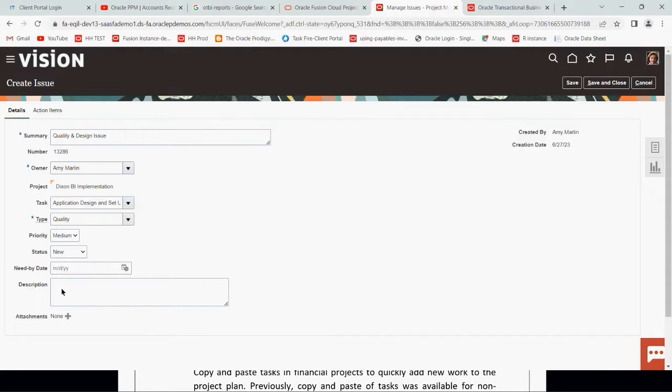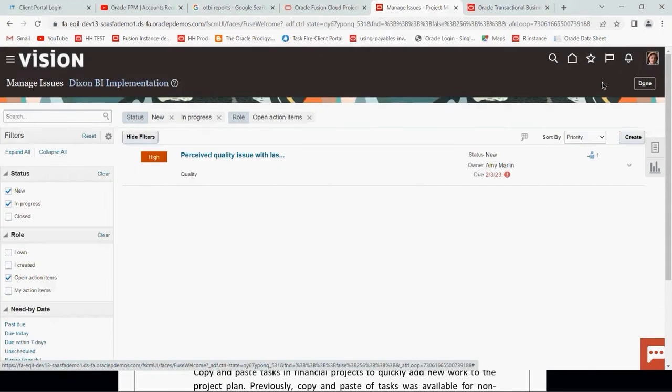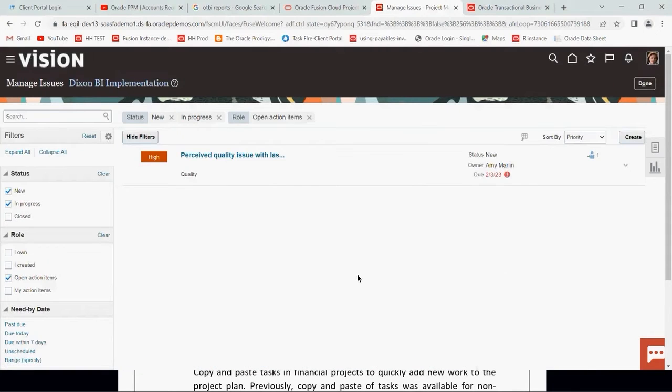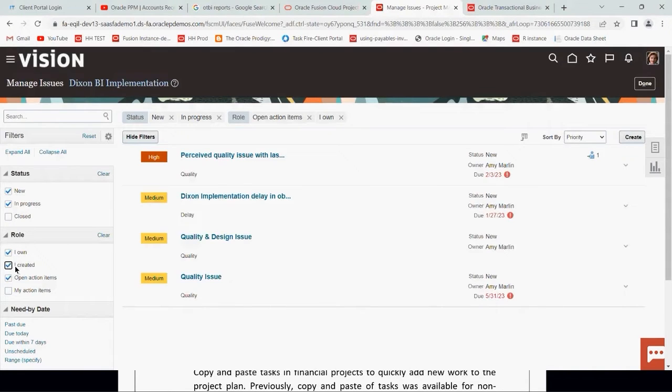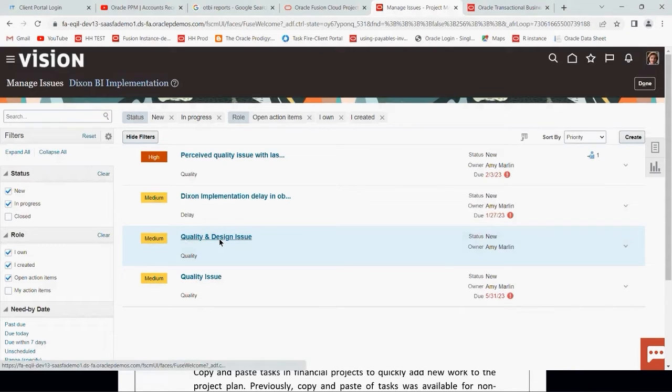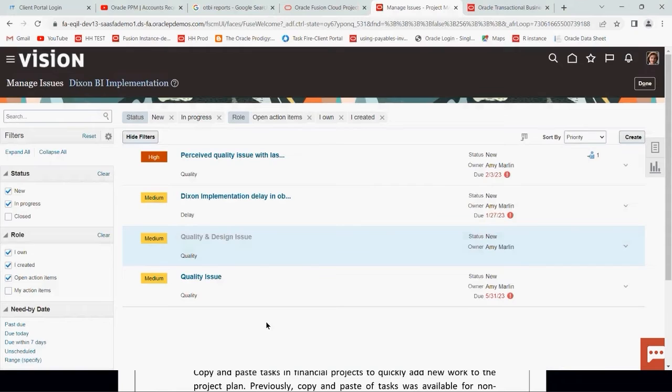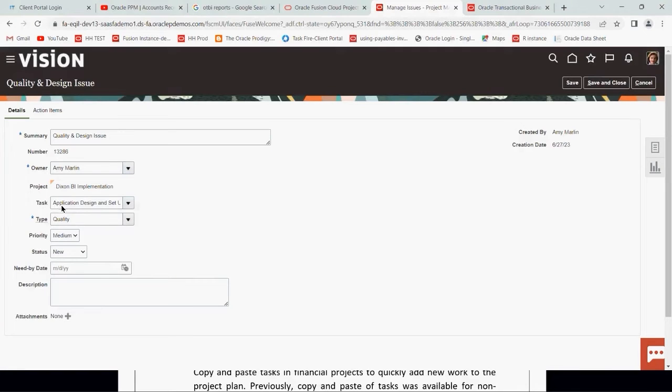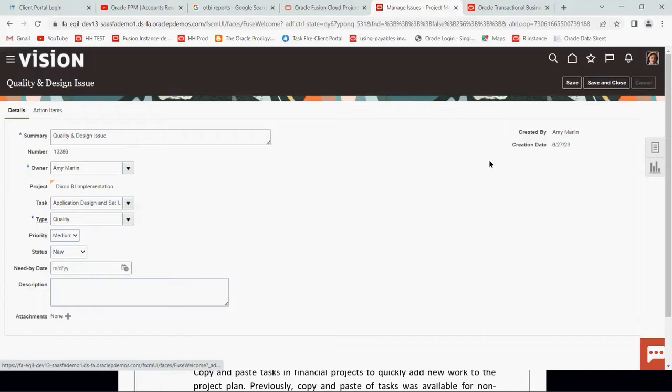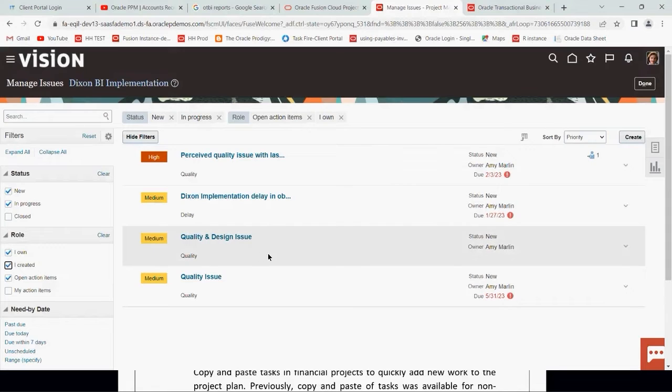Need by end it, you can write down description. Save and close. Now here we can see the issue which we have created. If you can't see it directly, click role I own or I create. We have created this one, quality and design issue. This is how you can create an issue and then link this to the task wherever it is applied. This is how the association of issue and task can be done.